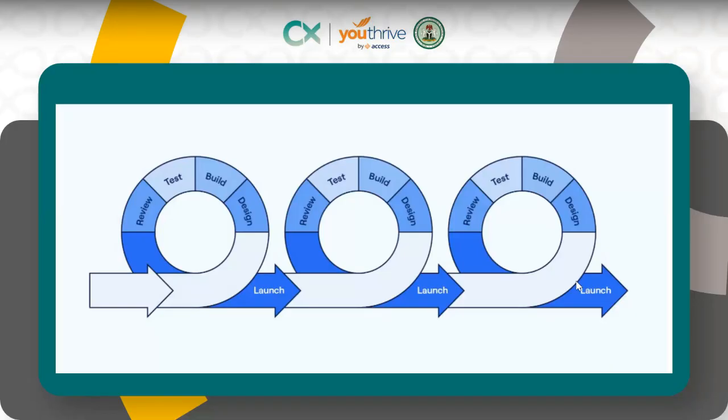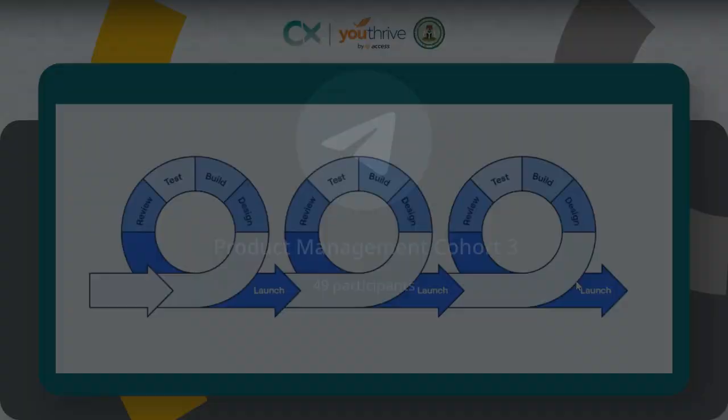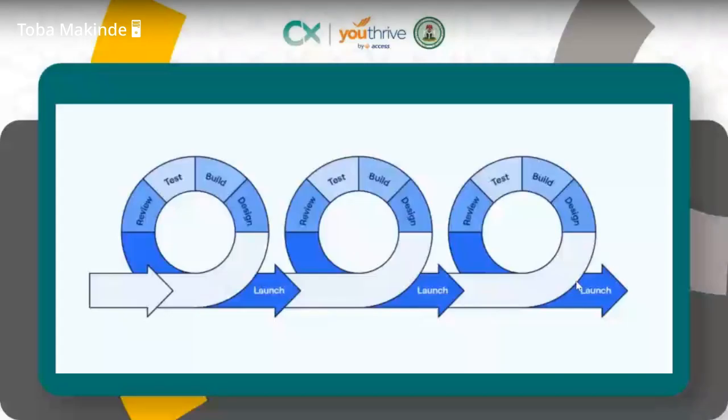So it's all about prioritizing some core features and breaking them into smaller pieces. As you are done with a particular section, a particular smaller task, you hand over to the next team. Then you take up another one and keep designing. As designers are done with the smallest portion of the product, they hand over to the developers. Developers build that one, get review, and you test it. So that cycle just keeps going, sprint after sprint.